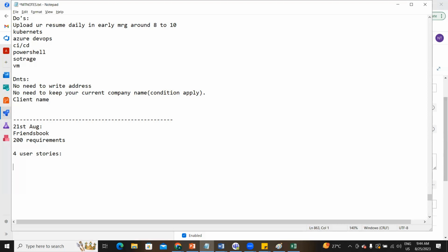Basically, it depends on your resources. Let's see, Dev, how many guys are there? 2 guys. QA, how many guys? 1 guy. And obviously, DevOps would be 1. Got it. Based on that, we'll analyze. Dev 2 guys: that means daily, how many hours will they work on average? 4 to 6 hours. Very good. But I'll go with the average case.